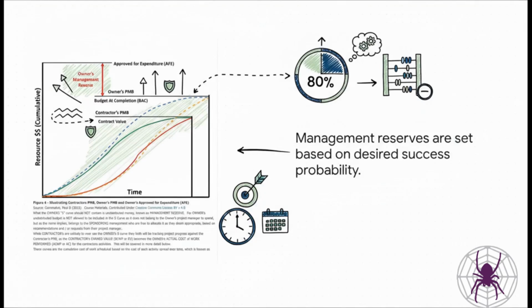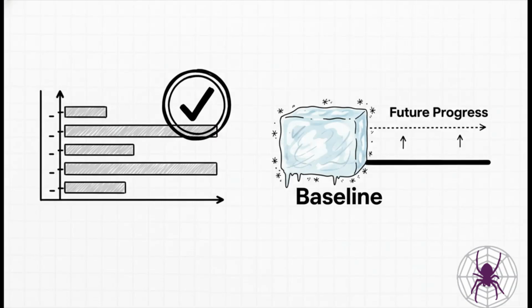This S-curve is what you get as an output, based on whatever success probability you're aiming for. Let's say it's 80%. The simulation tells you exactly what management reserves, or buffers, you need for both time and cost. The key here is that these reserves aren't arbitrary. They are the calculated contingency you need to protect your targets against the risk you've defined. Once this risk-adjusted schedule with its calculated reserves gets the green light, it gets locked in. We freeze it, and it becomes the official project baseline. This is the benchmark that all future performance is going to be measured against.